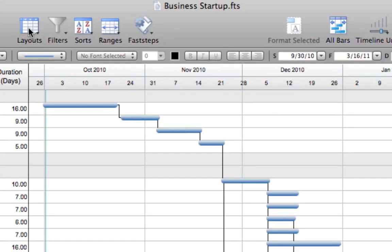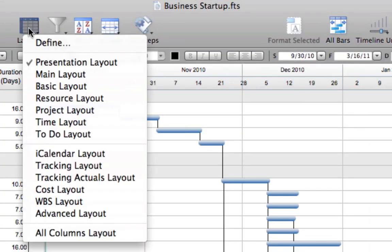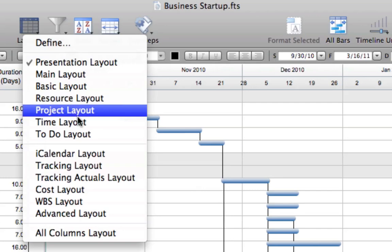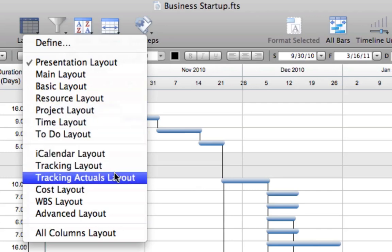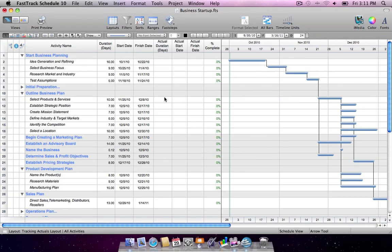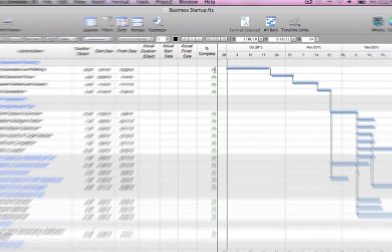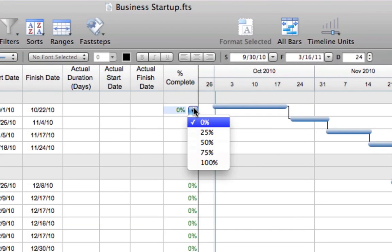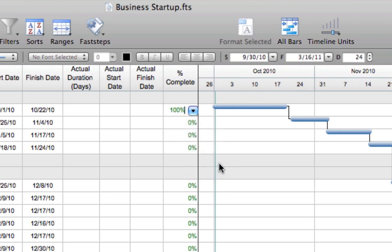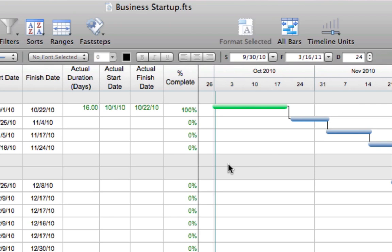Use the progress tracking feature to make status updates while keeping your original plan intact. Switch to the tracking actuals layout to view the actual date and duration columns. As activities are completed, mark them as 100% complete, and activity bars will automatically update with a green fill to indicate the level of percent complete.